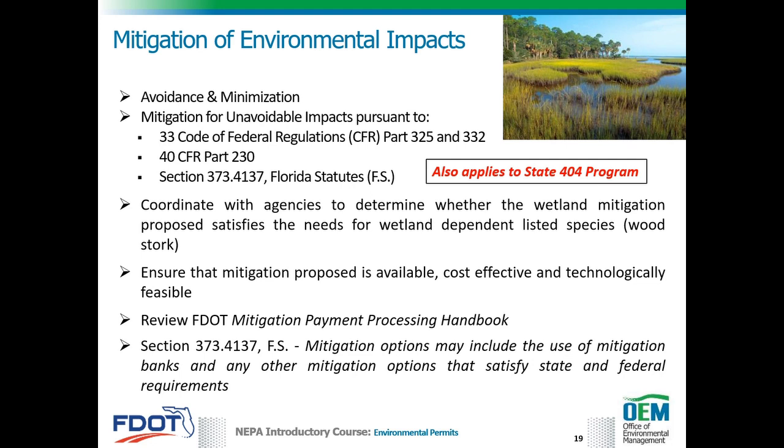Coordinate with agencies to determine whether the wetland mitigation proposed also satisfies the mitigation needs for wetland-dependent listed species, such as the wood stork. FDOT needs to ensure that mitigation options are available, cost-effective, and technologically feasible prior to advancing the project to final design.